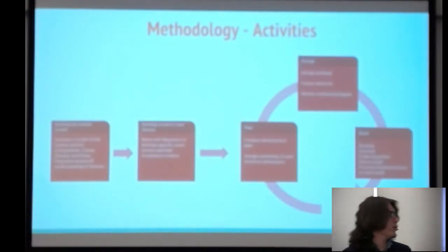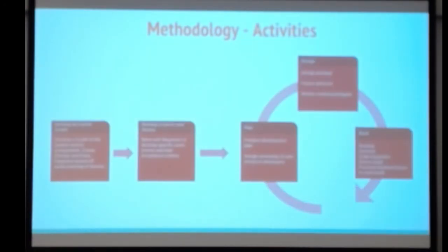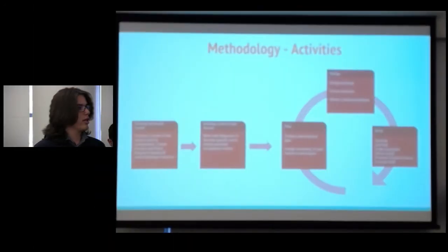So how does the methodology play out? The first thing we did as a team, after the first couple of meetings, was a domain walkthrough. We needed to understand what we were doing. First, we tried to understand what the whole project entailed, and then we made a couple of visits to actual Wegmans stores to understand firsthand what they needed and what they were doing. From that, we developed an overall model, essentially a first draft of how we think the whole system is going to look.